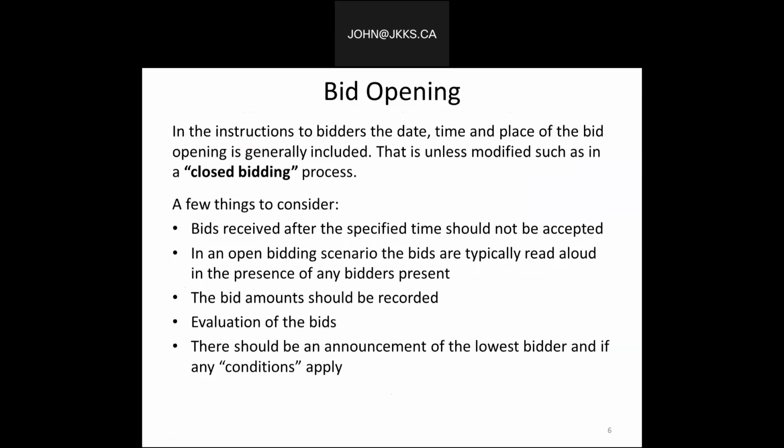On our next slide, in the instruction to bidders, the date, time, and place of the bid opening is generally included, unless modified, such as in the case of a closed bidding process. I've listed here a few things for consideration. A few of the bid opening procedures to consider include the following. Bids received after a specified date should not be accepted. In an open bidding scenario, the bids are typically read out loud in the presence of any bidders that are present. The bid amount should be recorded.